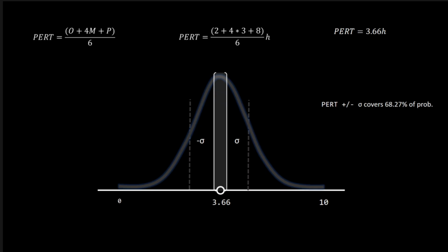We also know, as a property of the normal distribution, that one sigma to each side of the mean represents about 68% of the entire set of probabilities. That is, if we calculate the range with just one sigma, we will be estimating with almost 70% accuracy. This is huge and a solid step forward from just guessing estimates.